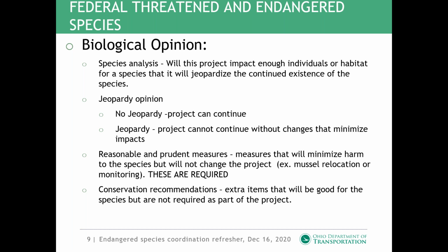Now, if you have an emergency project or unforeseen circumstances, there is a streamlined process, so it won't take as long, but that shouldn't be depended on. It's really stressful on all agencies involved because it's a very sped up procedure. But things like the bank collapse at Vermin Road, or when a new species record is found in a stream where we didn't think it would be, in those circumstances, we can get coordination done more quickly.